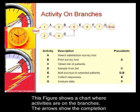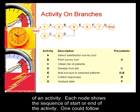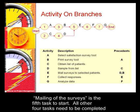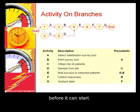This figure shows a chart where activities are on the branches. The arrows show the completion of an activity. Each node shows the sequence of start or end of the activity. One could follow the nodes to identify which activities have to start when. In this example, task E, mailing of the surveys, is the fifth task to start. All other four tasks need to be completed before it can start.